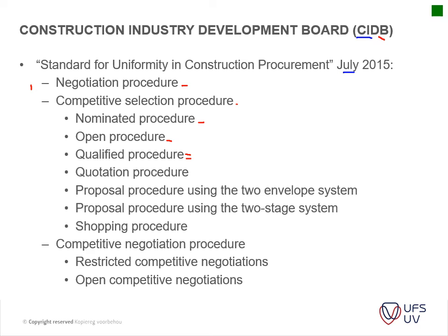Then you've got your quotation procedure, where you usually don't have a design, so you put out an advert that people can do a design and a quotation to install this building. Also, usually something like a competition is run, and the best design and cost-efficient procurement is used. This procedure is done quite often in America, where they've got a bid system, basically. The client would put out a need, and then it is for the contractor to do the design and the costing for that.